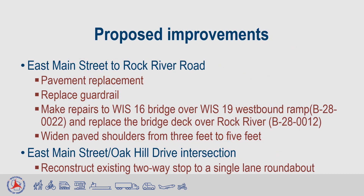The pavement replacement project will remove the existing pavement and base course. The pavement will be replaced with 6 inches of new asphalt on 26 inches of new base material on top of geogrid material. In addition to the pavement replacement, the guardrail along the corridor will be replaced, repairs will be made to the structure over the Wisconsin 19 exit ramp, the deck of the structure over the Rock River will be replaced, and the existing three-foot paved shoulders will be widened from three feet to five feet.